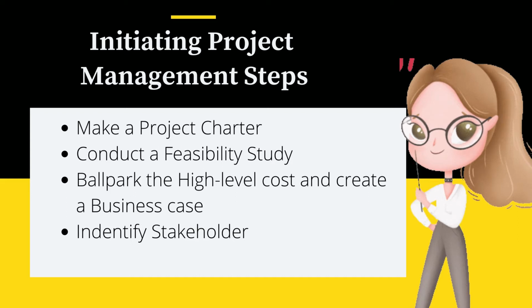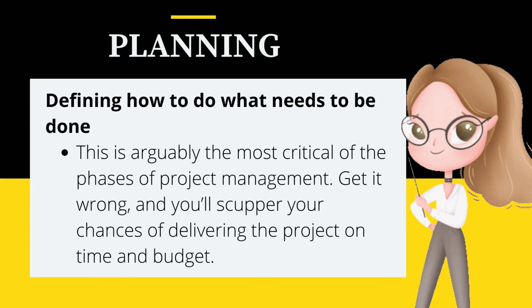It answers the question, what is the product or service that needs to be provided? Next, conduct a feasibility study. It answers the question, what is the primary problem and its possible solutions? Next, ballpark the high-level costs and create a business case. It answers the inquiry, what are the costs and benefits of the solution? And lastly, identify stakeholders. It answers the question, who are the people this project affects, how, and what are their needs? Now, let's move on to the next phase, which is the planning phase.